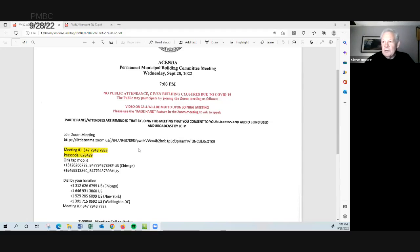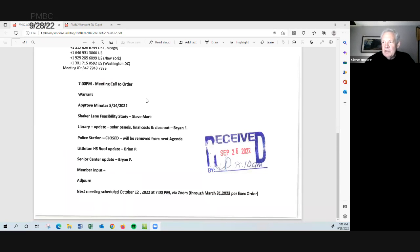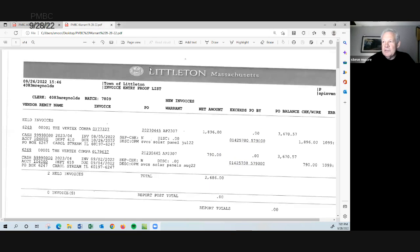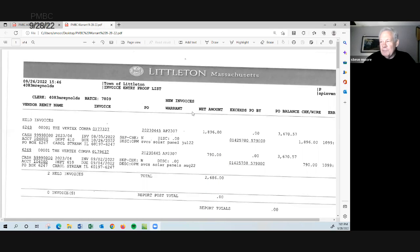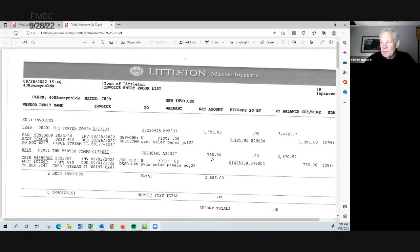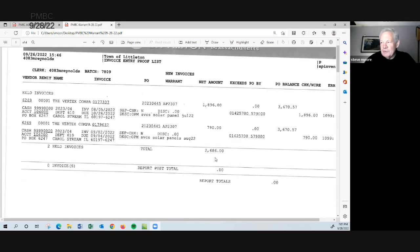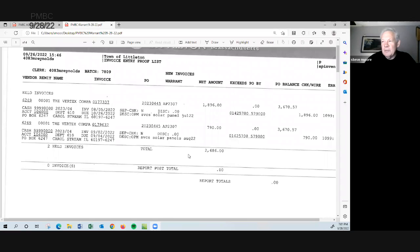Hello everyone and welcome to the PMBC committee meeting for Wednesday, September 28th. I'm going to bring up the agenda. So we'll start out with the warrant. We only have two items on the warrant here. They're both for the Vertex company, both for the solar panel project at the library. The first one for $1,896 and the second one for $790 for a grand total of $2,686. I had distributed this earlier. Are there any questions from the committee?